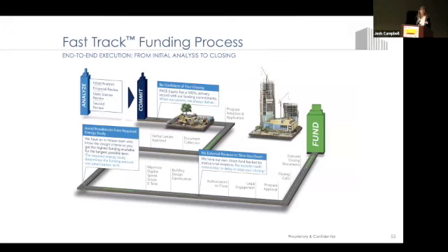So depending on if it's a recapitalization PACE, that would fund into an escrow account and pull directly into the property owner's own funds because they've already paid for those. If it is new construction or redevelopment, it's going to fund into escrow, and then we will work with the senior lender's draw schedule and fund pro rata.